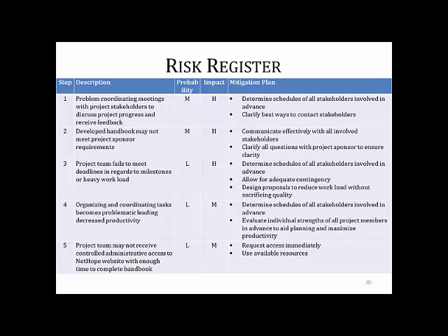The final risk is that the project team may not receive controlled access to either the Google Analytics or the Expression Engine backend. The probability was low, but the impact was high. To avoid these problems, the team requested immediate access to all available resources from the NetHope team.